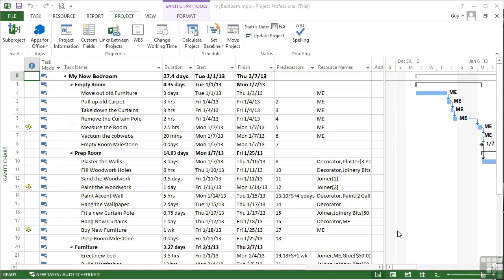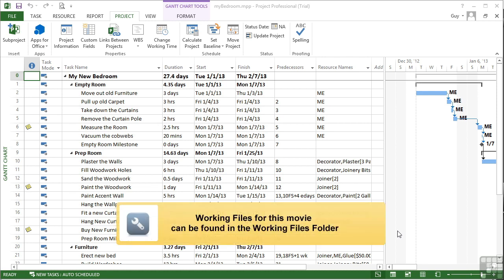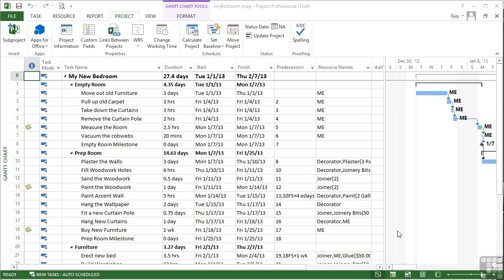So we've explored changing and editing the standard calendar and also the work resource calendars, bearing in mind each work resource has their own calendar. What we need to also look at is the ability to add in recurring absence patterns. So for things like holidays or public holidays like bank holidays, all need to be entered into one or more of the calendars so that they affect your project.